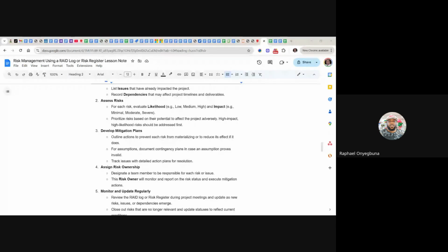We probably will not have money to employ 2 business analysts, but every other person within the project team should know what the business analyst is doing, so that when the business analyst or whoever it is leaves the team, whoever we bring on board to take over would have something to fall upon. So that is also taking contingency measures to ensure that we don't take a key man risk.